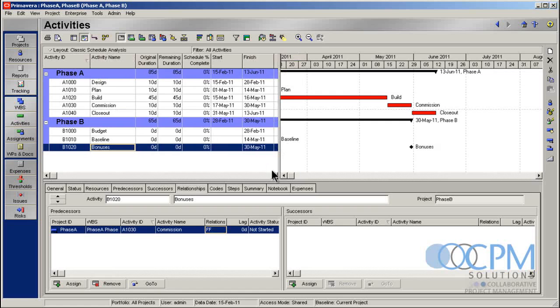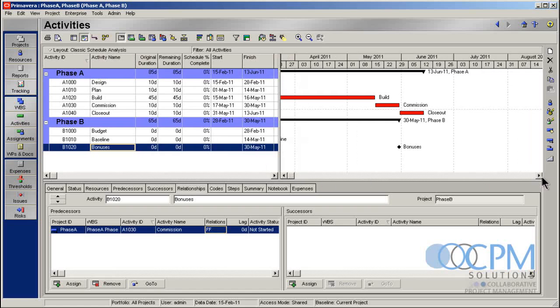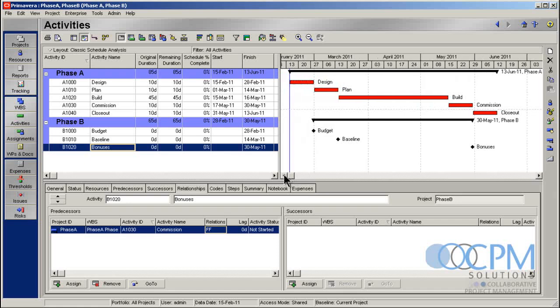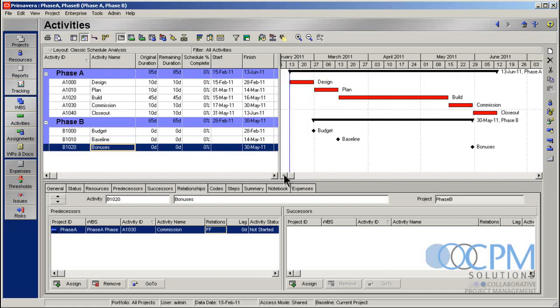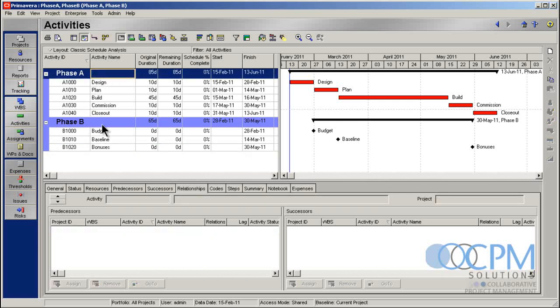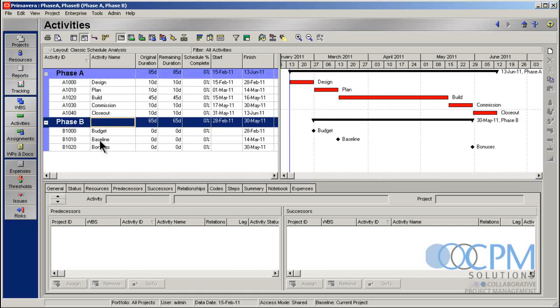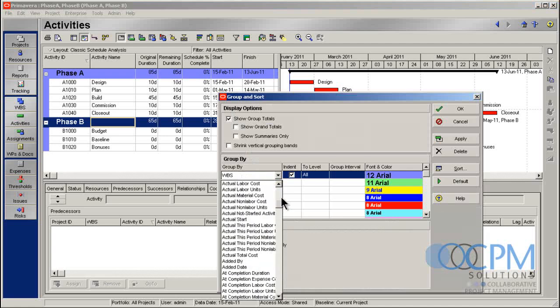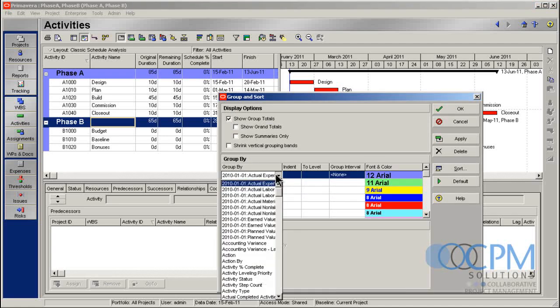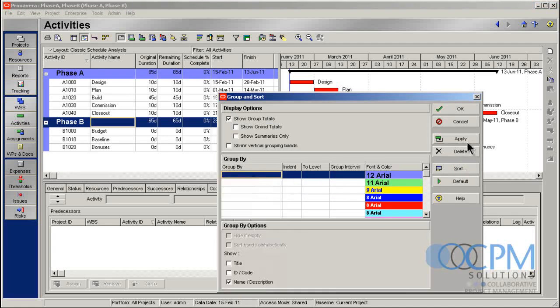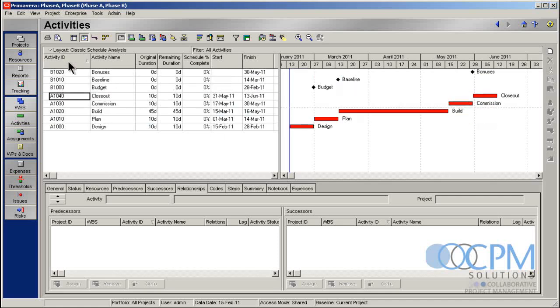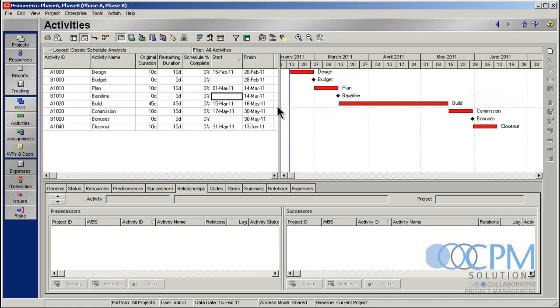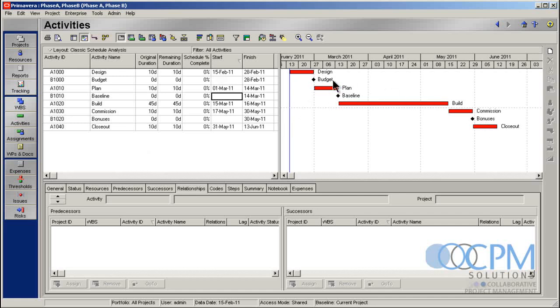The nice thing about Primavera is that a project is just a compilation of activities. And those activities just sit in the database somewhere. So activities are really kind of wrapped in a project wrapper. But if I've got this project wrapping these ones, and this project wrapping these ones, because they're all in the same database, it's really easy for these two projects to kind of work together as one. So here's what we can do to get a visual of that. I can go in here. I'm going to turn off my group and sort. And I'm going to go ahead and organize these by start date. And now I get a visual on the project with the activities interrelated and showing up on the Gantt chart where I want them to. So essentially, I can work with these two projects as though they're one in this fashion. Now, let's dive into some more interesting things.